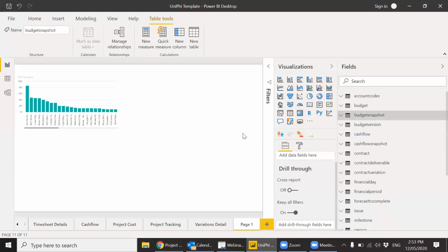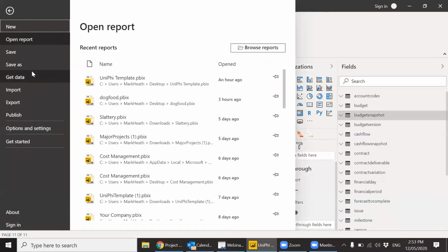But we use the box and whiskers to measure the difference in floor rates by element or by level 2, like superstructure, substructure, columns. So you could do it in an IT world on project management hours versus system architect hours versus developer hours and BA hours. So those sorts of things. But typically you're going to need custom field data to get the right metric metadata, and you can then use a box and whiskers.